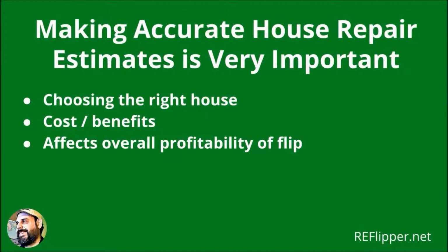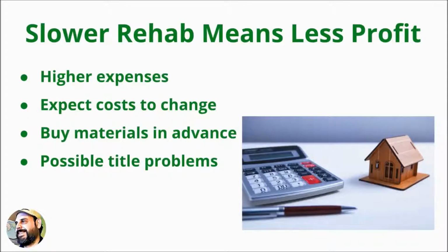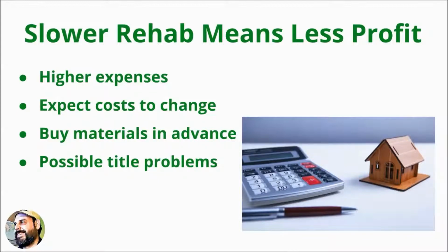The cost benefits of taking on a project very much depend on the investor's ability to estimate repairs quickly and accurately. The more time you own a property before the resale, the higher your expenses like taxes, insurance, utilities, and maintenance become. The faster you get a rehab finished, the bigger your profit on the house sale will be. Nevertheless, you can't control everything, so be prepared for your investment and carrying costs to change.